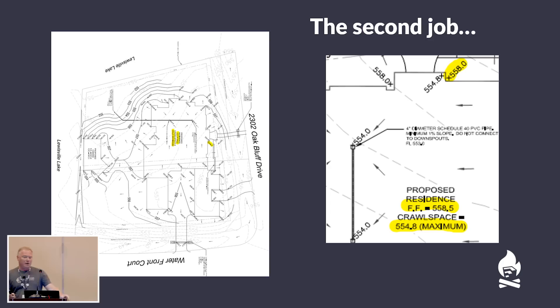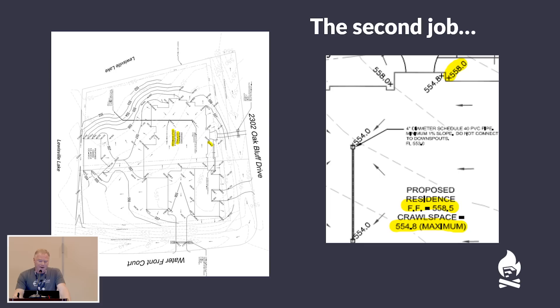Victor Myers in Dallas was getting ready to build a big 9,000 square foot house on pilings and grade beams — a crawl space because the soils on this lake community moved dramatically. He asked if I could start with the foundation. The first thing I saw on the site plan was that the finished floor reference was 558.5 and the grade just outside was 558 — only 6 inches of clearance. He had about 14 inches of floor system, so I could immediately tell there'd be a problem.